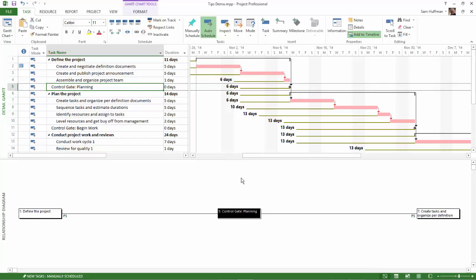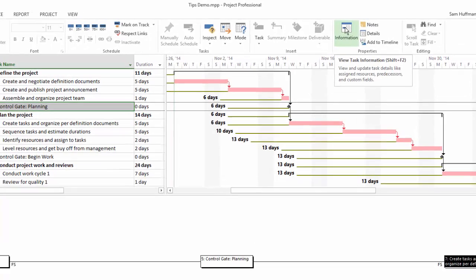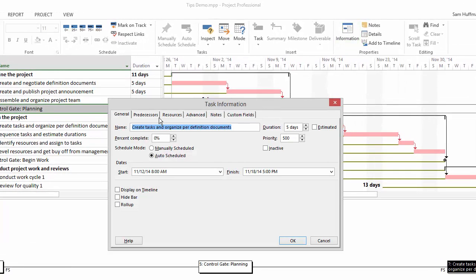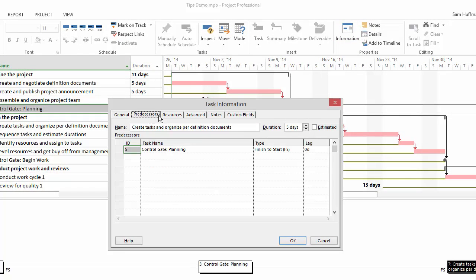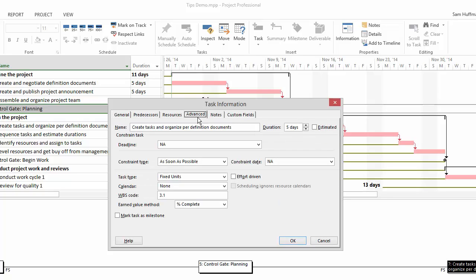To see any task detail that's appearing in the bottom pane, just click on the task, and then again in the task tab on the Properties group, click on Information, and Project will tell you what you need to know. Predecessors, resources, and other things, such as if there is a constraint or not on the task.